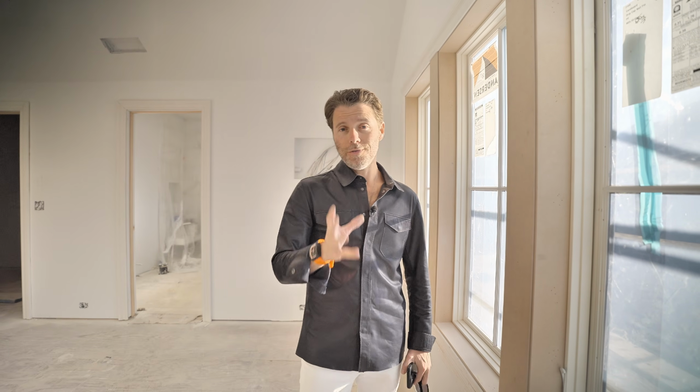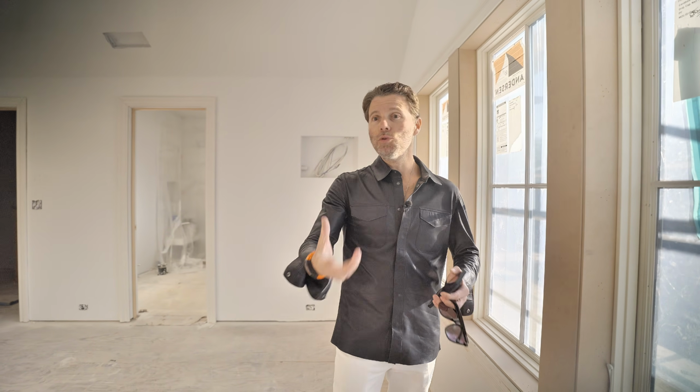So it's very important to have very good quality control and very good due diligence before we submit the plans, right? Sometimes if you work with an individual architect or an individual designer and plans are submitted and something is missed from the details, it will take another month to 2 months just for them to respond to you. We're missing that little detail, and now you've been waiting for 2 months, which to me is very, very annoying. I see those situations.